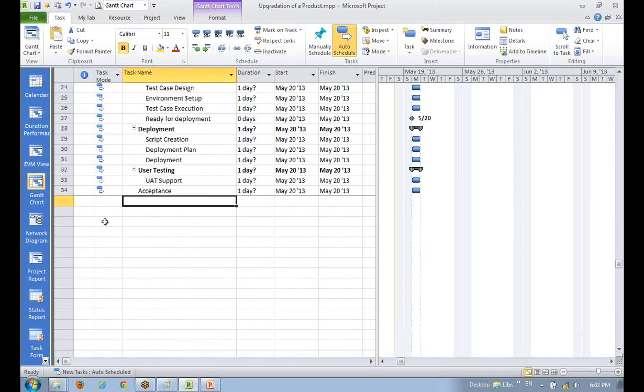I'll show you. Suppose here I don't have anything. Let me change it to manually scheduled. Now it is a pin mark. If I add a task here, it is a pin mark here, right? And nothing is here. Correct. But if you make it auto scheduled, this mark will automatically fill. If you do some edit, the question mark goes away automatically. Yes, if you add something, the question mark will go, but it cannot be blank.